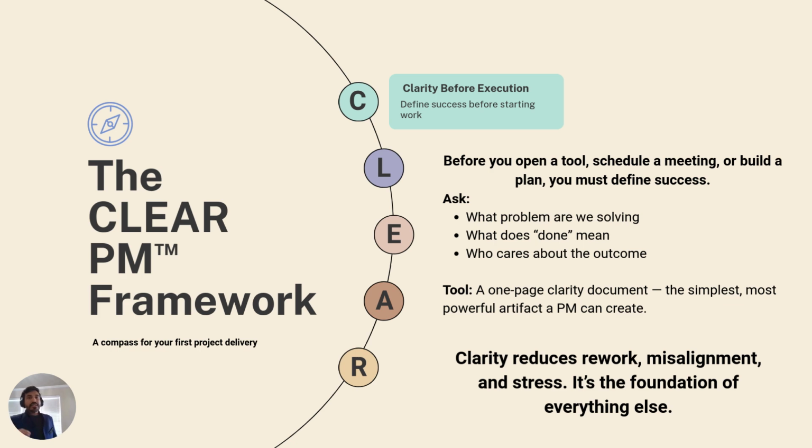So clarity before execution is a must. What I generally do in my current project, whenever I start a project or whenever I feel like I don't understand what I'm going to do, is create one Excel and say, this is my scope, these are the key stakeholders, this is what I want to deliver, and this is my timeline. So at any point of time, if I refer to that document, it will be easier for me to move further and make a decision.